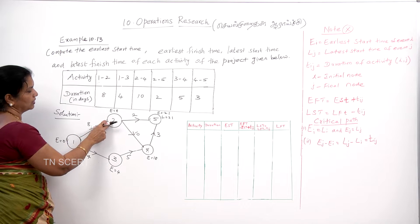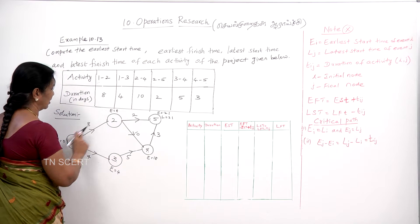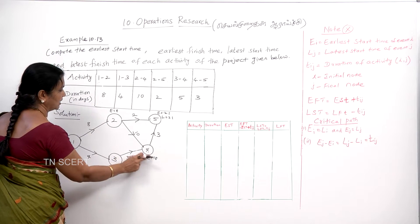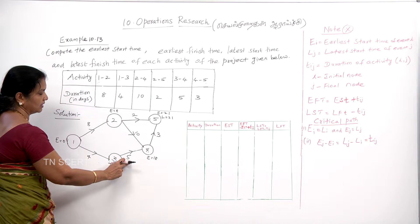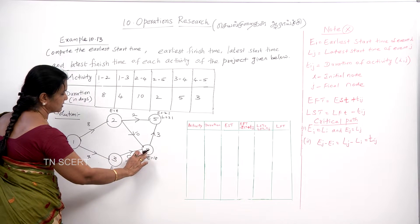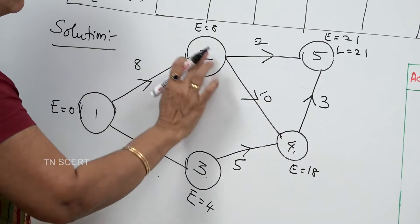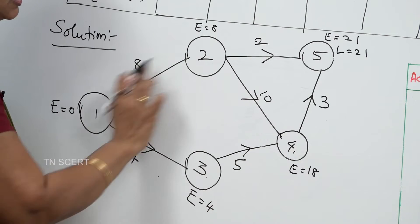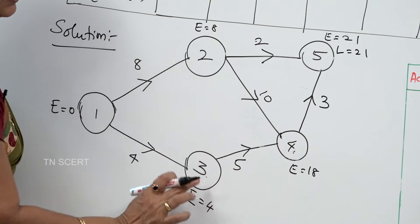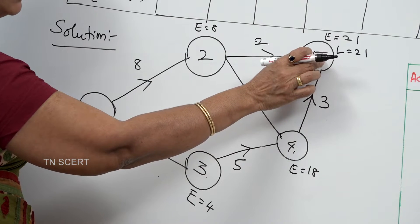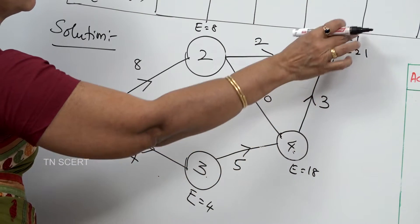Path 2→4, 1→4 gives 18 days. Path 1→3, 3→4 gives 9 days. Now, where is the shortest or greatest number? 18 is the greatest number. That's why we take 18. We take the maximum number for 1 to 4. Next, we take the maximum number; for 4 to 5 it will be 3 days. So 18 plus 3 equals 21 days.